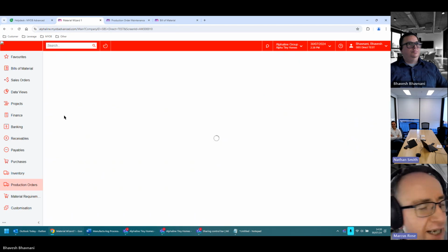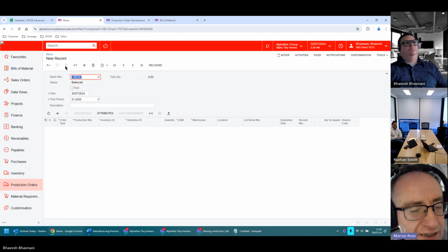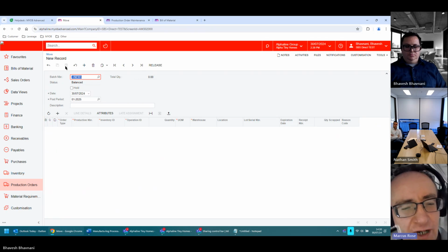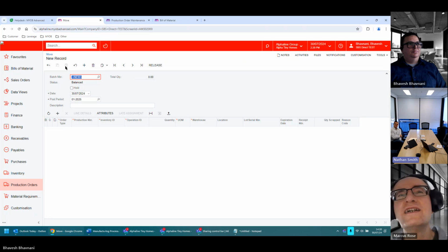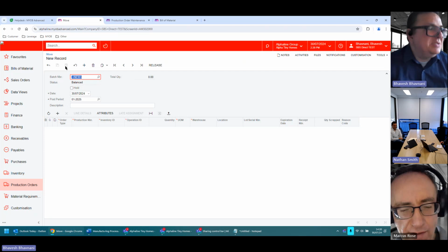One of the things Pravesh clearly highlighted is, from a change management perspective, during the UAT, UAT serves 2 purposes. One is to obviously validate the system, make sure it works and is fit for purpose. The second is to look at roles and responsibilities and make sure people understand, when you do go live, who's going to be pressing which buttons and when. So some change management on your side, I guess.